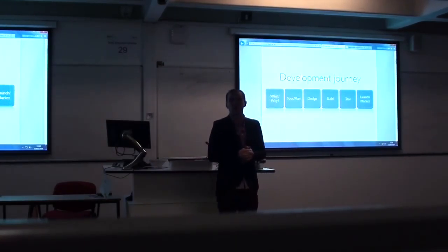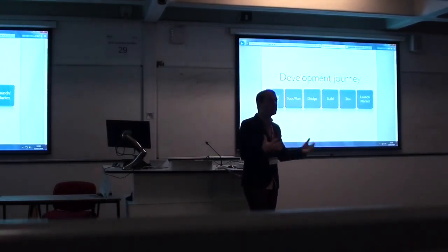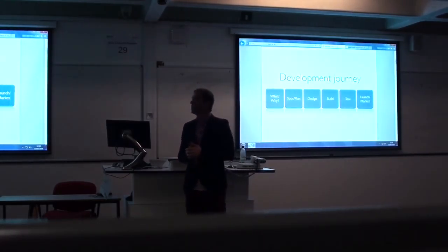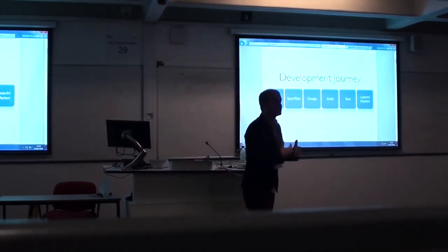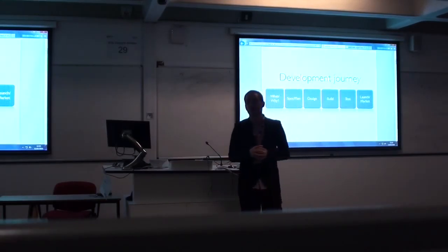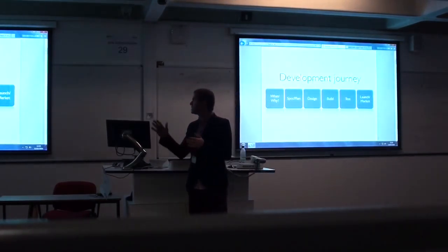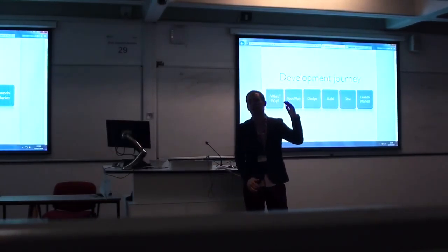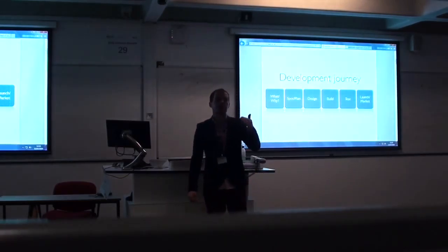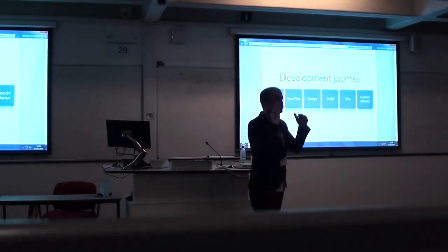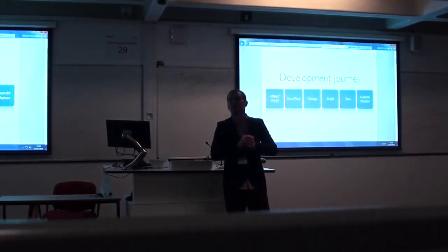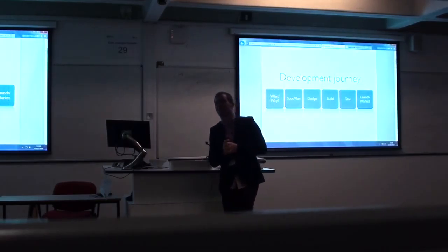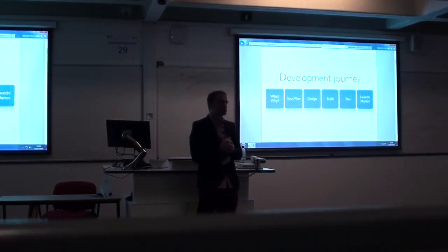So once you've laid out a clear justification as to why you need this done, you need to start developing a plan, right? A specification plan. Now, the specification plan will lay out the entire process on the feature that needs redesign or redevelopment, and also clear ideas as to the timelines by which these features need to be designed, when they can be tested, and when they go live to the marketplace, right?